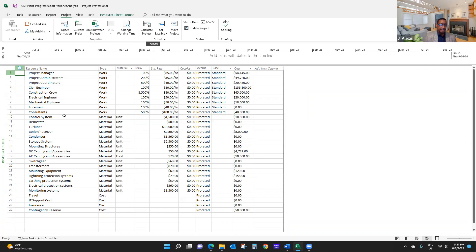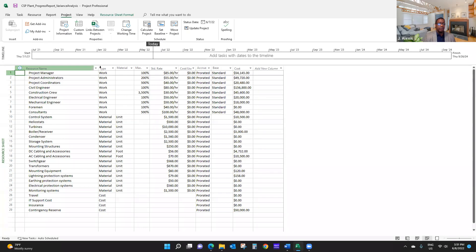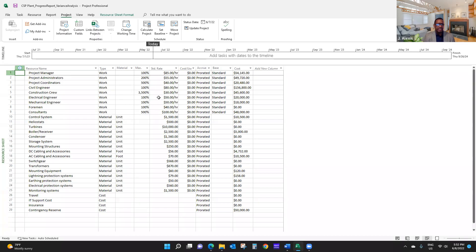Since this is a good plan, I'm going to assume everything is okay and set a baseline. I set a baseline for the entire project, as you can see in this dialog box, and I click OK. So now I do have a baseline. Another thing I need in my plan before setting a baseline is to make sure that I have contingency reserve. In another video, I explained how a project budget or project plan without contingency was a bad plan. As you can see here, I do have contingency reserve, so that's perfect.